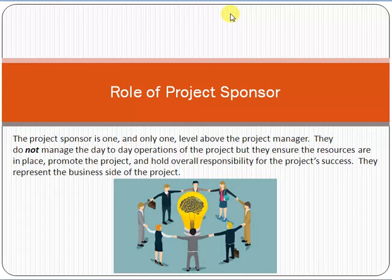A project can never be an ongoing activity. Examples of projects include building a house, building a flyover, implementing an e-commerce solution, or implementing a mobile app for a bank. Production of chairs in a factory is not a project because it is an ongoing activity — it is not temporary, and it always gives the same result. So two important key factors must always be present in a project: first, unique output; second, temporary.